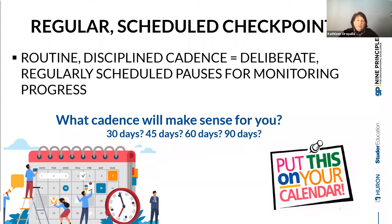The first thing to think about is regular scheduled checkpoints. The concept of routine discipline cadence really means deliberately and regularly scheduling pauses for monitoring progress. There's no right or wrong on the cadence, but most people typically look at things in 30, 45, 60, or 90-day intervals or cycles. If you're new to stoplighting, it helps to start at a 30-day period to build that routine and practice without as much pressure on the accountability side.